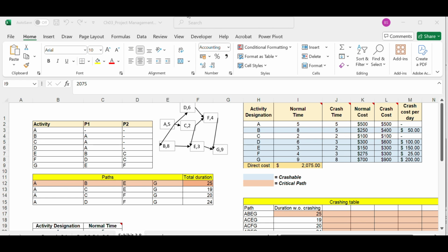In the critical path method, the focus is on task completion. We don't use buffer in the critical path method. There is slack instead of buffer, and we use a less flexible and rigid technique. CPM talks all about logical dependency. While for critical chain project management, the focus is on task scheduling or task sequencing. We use a feeding buffer, and here we don't use slack. Here we use more flexibility and it accounts for uncertainty. This addresses the logical and resourcing dependencies of activities.